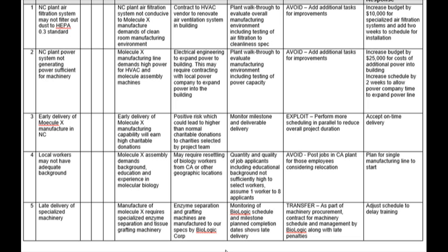It's clear, it's concise. I'm not putting multiple risks in. My risk is very specific. I'm not saying the project could be late. That's a terrible risk. Project can be late is the effect of a risk. There's a risk factor or a risk cause that will potentially make the project be late.